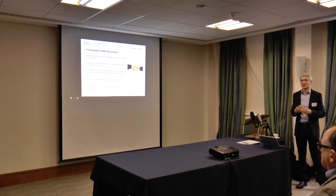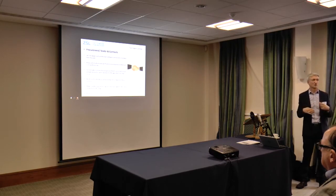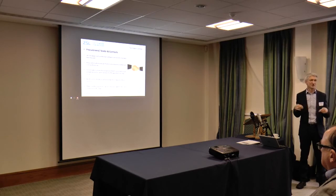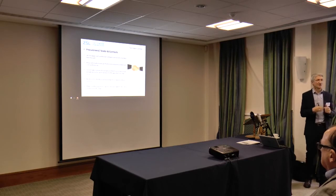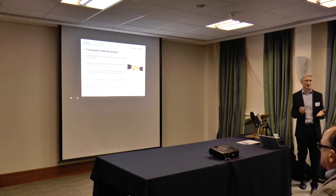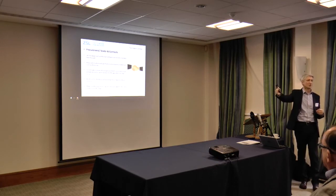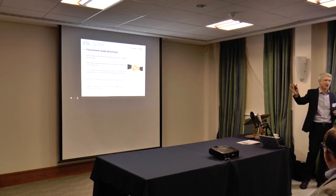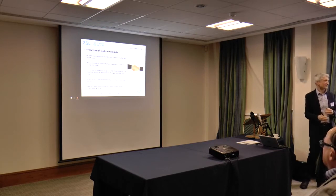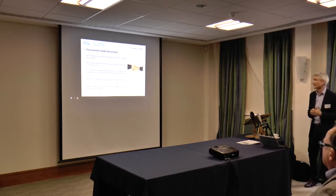And the other thing that I think is always difficult is think through what the reality is going to be like when you're thinking of your service level agreements. So if you've been running systems before, think of the sort of problems you've got now, and then go back and think, how would this service level agreement fix them? I still do it, and I should know better, but you tend to look at service level agreements, and they're so far away from where you are in the project, you tend to just think, oh, they look fine. And it's only when you go live you suddenly think, what were these SLAs I signed up for, and are they actually relevant and appropriate for what we want?